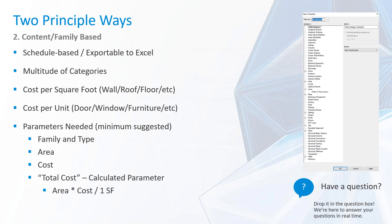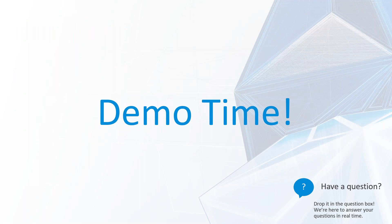Some parameters needed for this type of schedule: you're going to need your family and type, you're going to need area, you're going to need cost, and then again you are going to need a calculated parameter of area times cost — divide that by one so that the units cancel each other out. Everyone remembered their math classes from high school! So with that, let's hop into Revit and look at some of this in real time.